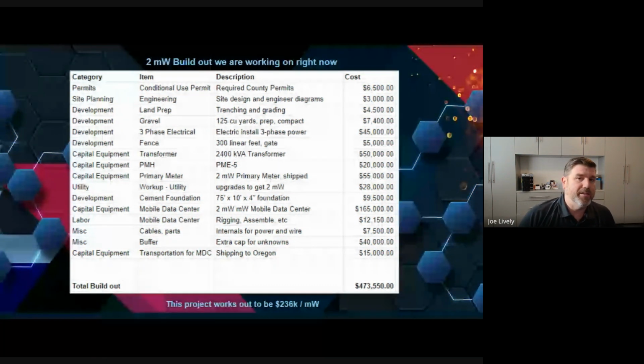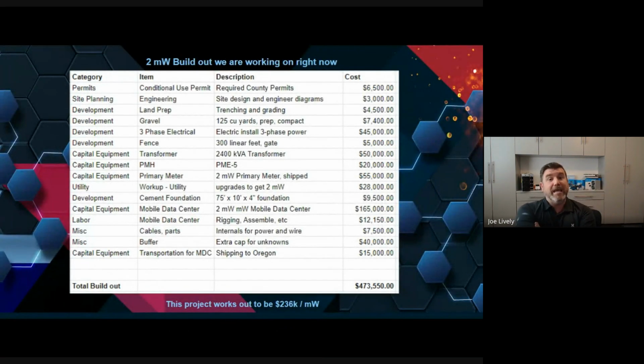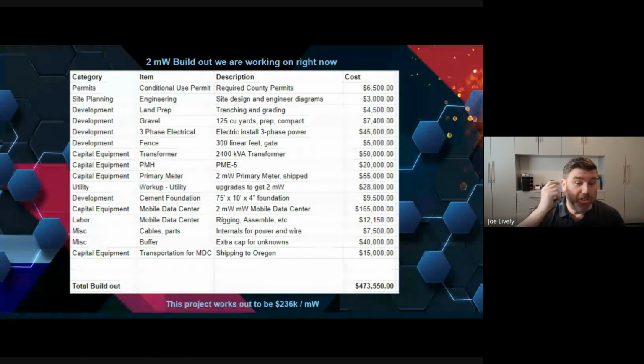55-week lead time is the best they could have done from their vendor. So I had to go out and work with another group to find a vendor who will physically build one to their specs. 15-week lead time, so still enough time that I got to wait for it. But it cost me $55,000 for that to happen. That's including shipping. So it's $50,000 plus $5 grand for shipping. It's coming from Canada. Awesome.